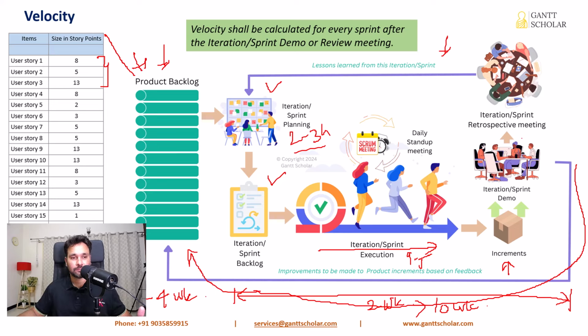product backlog. Now whatever items are accepted in the product demo meeting will be considered for calculating the team velocity. Let's say these 3 items are done by the team members and presented during the product demo meeting, and the PO and other stakeholders are fine with the work and have provided their formal acceptance. Now you can treat that the team has completed all the 3 features.